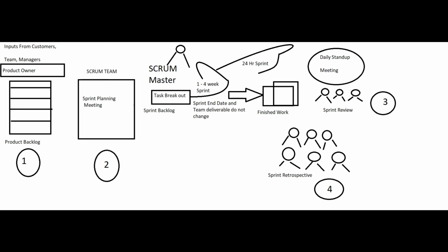Then coming to the Scrum meeting, the Scrum Master is going to conduct this meeting. It is going to happen each and every day for a single sprint. The maximum time for this Scrum meeting is mostly 30 minutes, usually we can say 15 minutes only. During this Scrum meeting we are going to discuss mainly what you did yesterday, I mean how much you completed yesterday, what you planned for today, and if there are any obstacles or impediments, what is your approach to resolve all those issues.